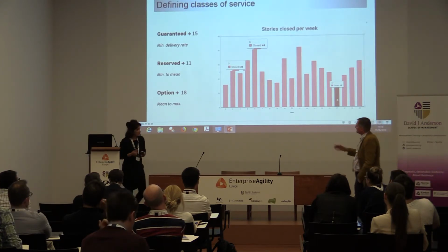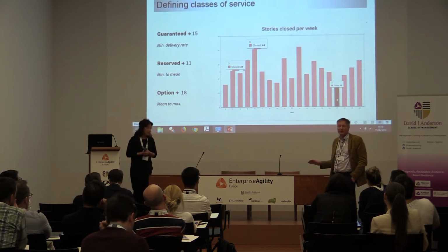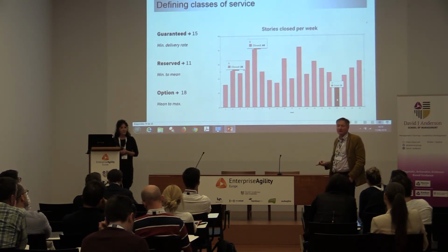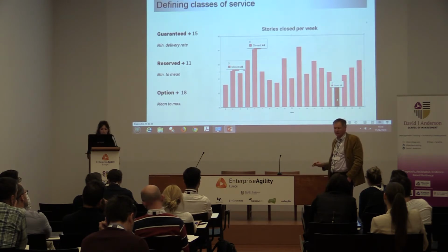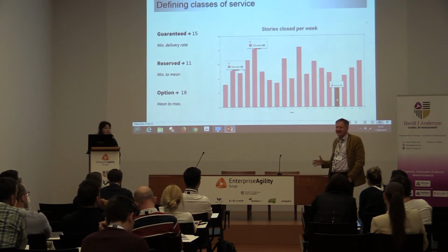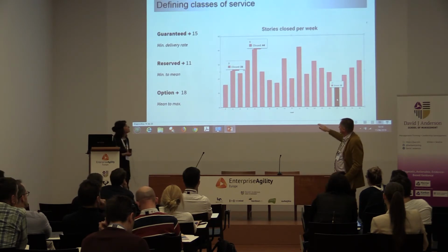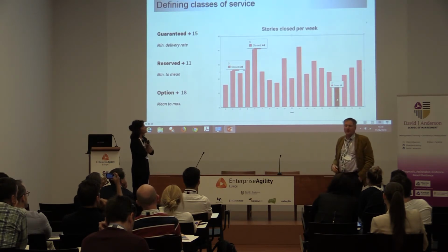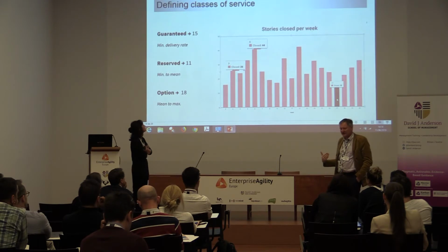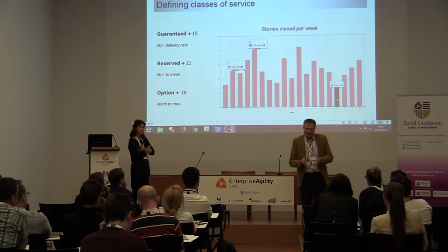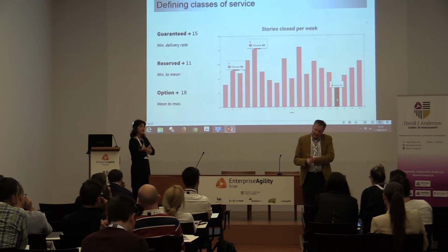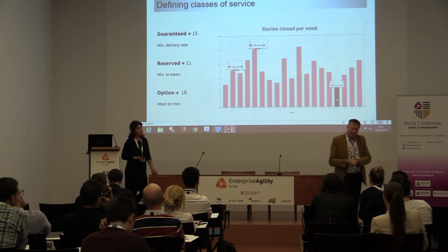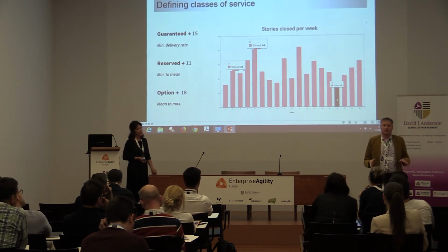More or less? So this team on average does 26 tickets per week. And on a bad week, the worst their performance has been is 15. So they're pretty confident they can always do 15. They'll probably do 26 more or less. And on a really good week, they manage to do 44. So they can afford to take 15 guaranteed slots, and then the next set from 15 to 26, those are fairly likely to happen, but from 26 to 44, that's very marginal.